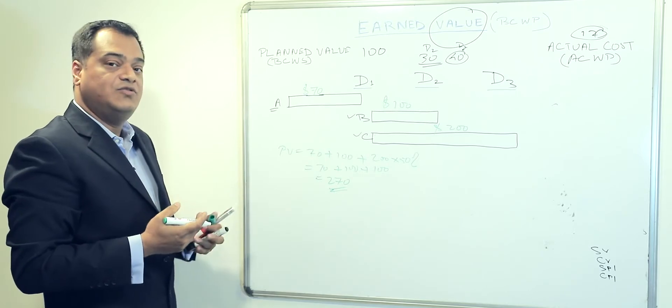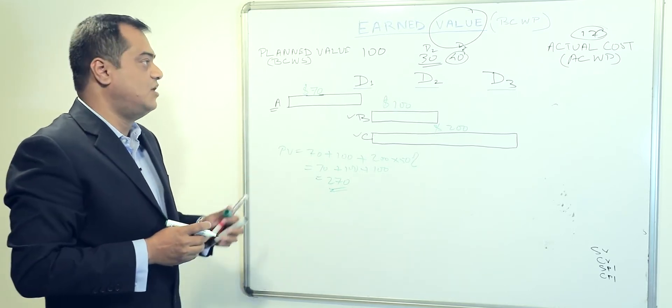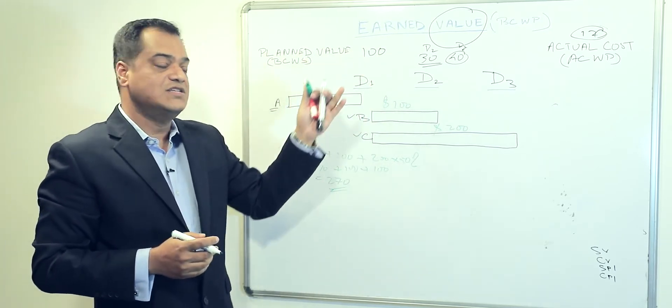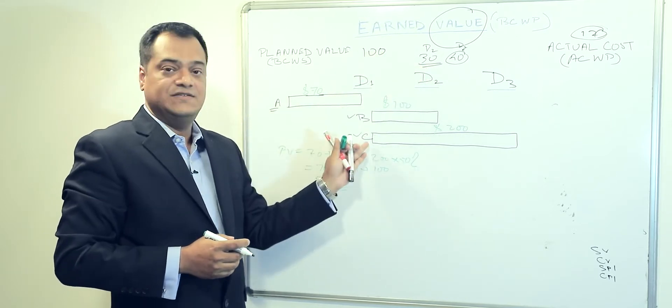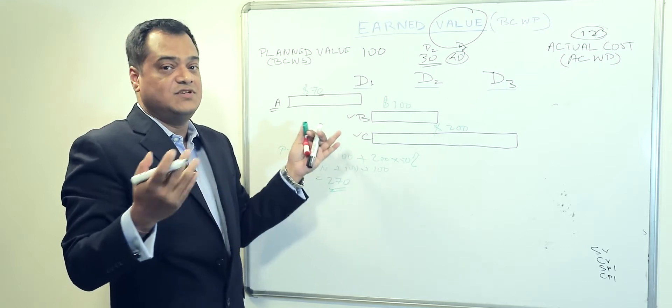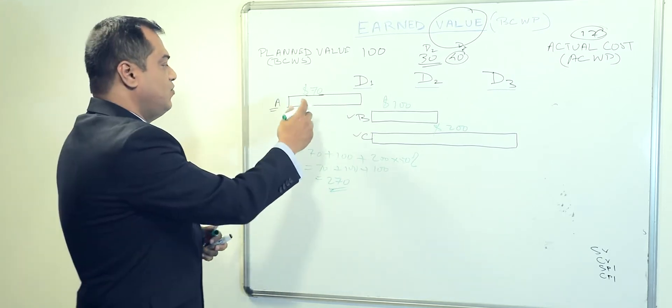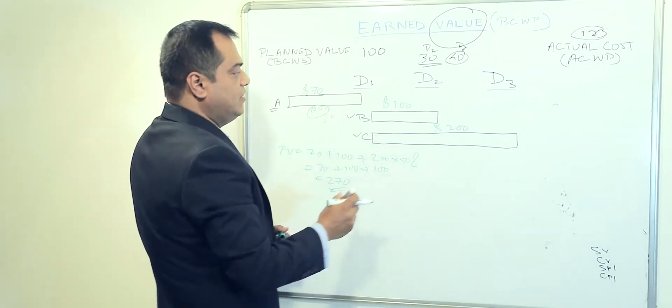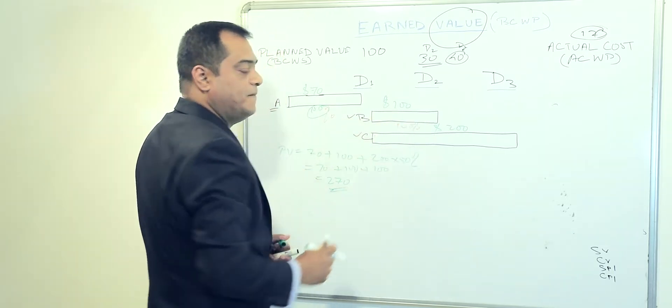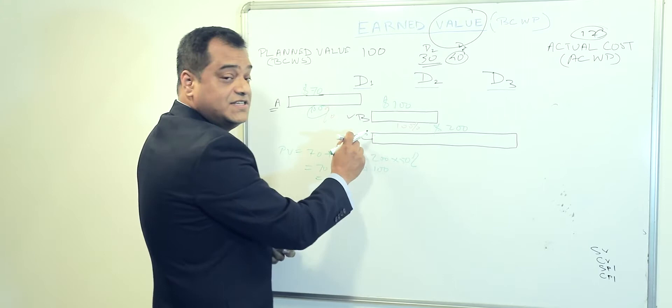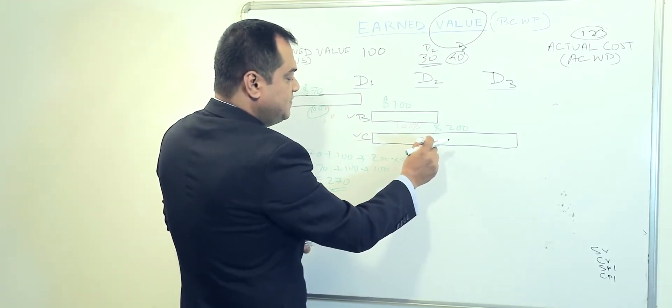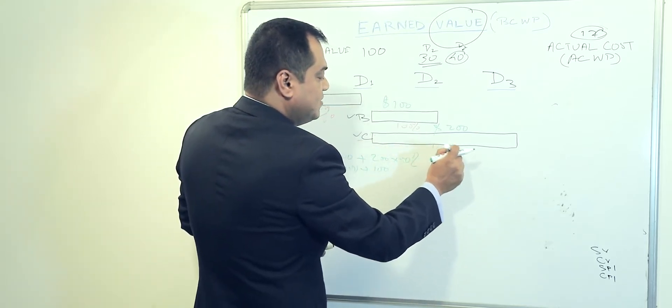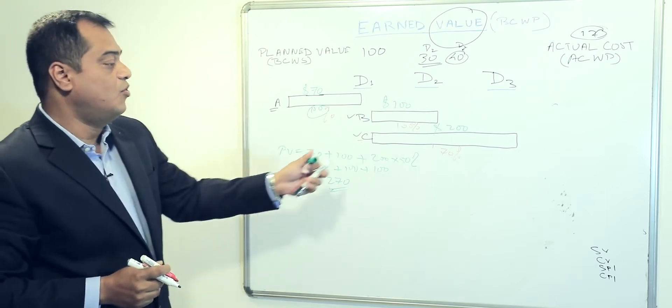Now how do we know the efficiencies or the earned value of the business? To understand the value of the business, we need to know the output from these activities, either output or in terms of percentage. Say for example, end of day one you have done 100 percent. End of day two, this is also 100 percent done. And now for activity C, you're supposed to do 50 percent as per the plan, but you have actually done 70 percent. That means you have done 20 percent more on activity C.